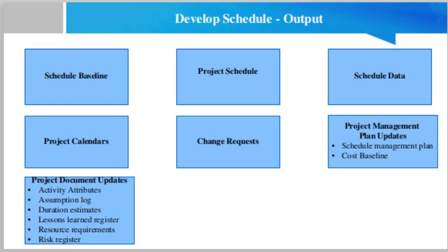Project calendars. A project calendar identifies working days and shifts that are available for scheduled activities. It distinguishes time periods in days or parts of days that are available to complete scheduled activities from time periods that are not available for work. A schedule model may require more than one project calendar to allow for different work periods for some activities to calculate the project schedule.